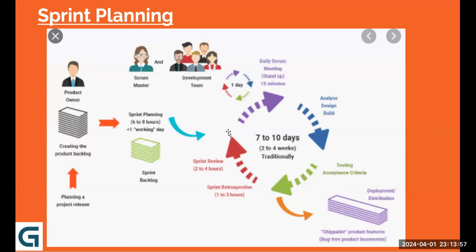And the moment this implementation starts, every single day you meet for 10 to 15 minutes. How long will you meet every day? 15 minutes. Yeah, together. And for what reason will you meet? A daily scrum, to discuss the daily progress, what needs to be done, any impediments, how things are moving. Yes, yes.